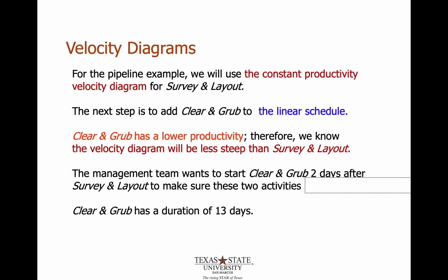everywhere. The management team wants to start clear and grub 2 days after survey and layout to make sure that these two activities will not conflict, so that their lines will not cross. In addition to that, so that there's enough space for people and equipment to do their individual activity. You could get real close to the lines on the graph, but you also want to ensure that you have enough space for safety reasons and for good quality and control reasons.